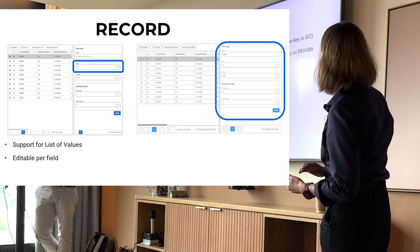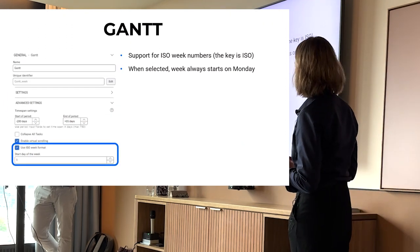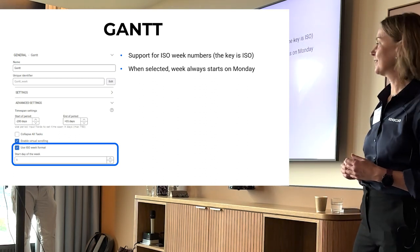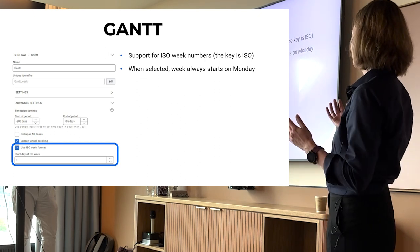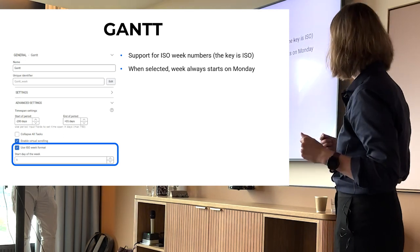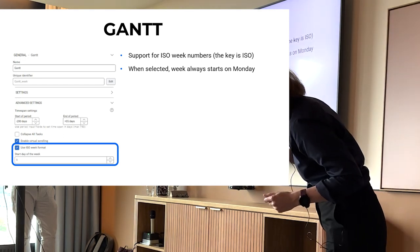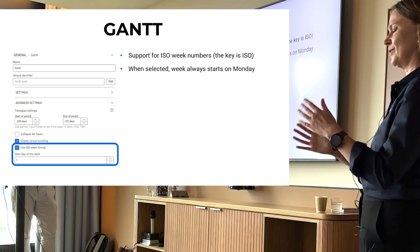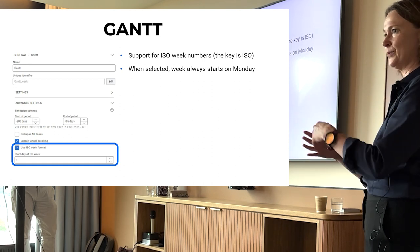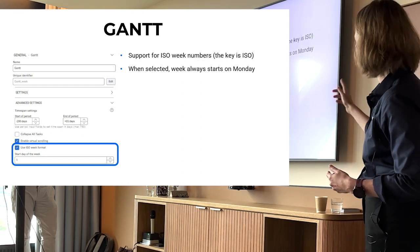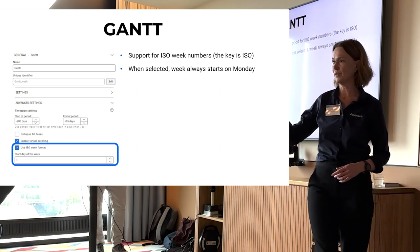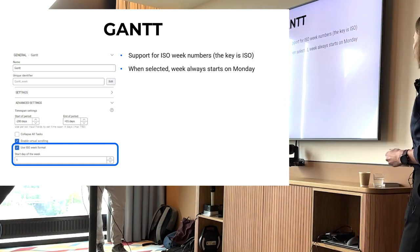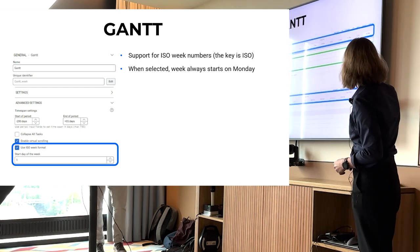And this is a change to the Gantt chart on a request from one of our customers. In Sweden especially, we work a lot with week numbers rather than dates. And the Gantt used to be set only or show only dates, but the request was now that they want to show the week numbers in certain views. So there is a configuration setting to say use ISO week formats. Please note, ISO formats. So if you are in America, it's not the American weeks, it's the ISO format. And since ISO will always start on Monday, that means that if you have this setting active, the start date will always be set to Monday.